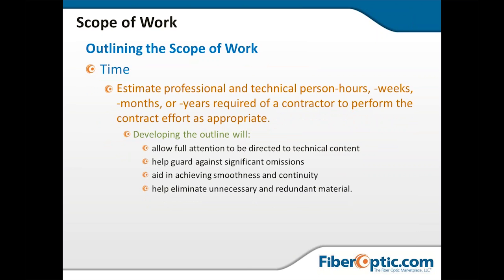Time: estimate the professional hours that are going to go into it. So before we deploy, we always calculate everything in man hours. So we know how many man hours we have, and then we can figure out whether we want to go into overtime or not. But if the customer says, hey, we're working on a mall in Rhode Island right now, and the customer needs us in and out in a week, so we have to calculate how many man hours it is to do this project.